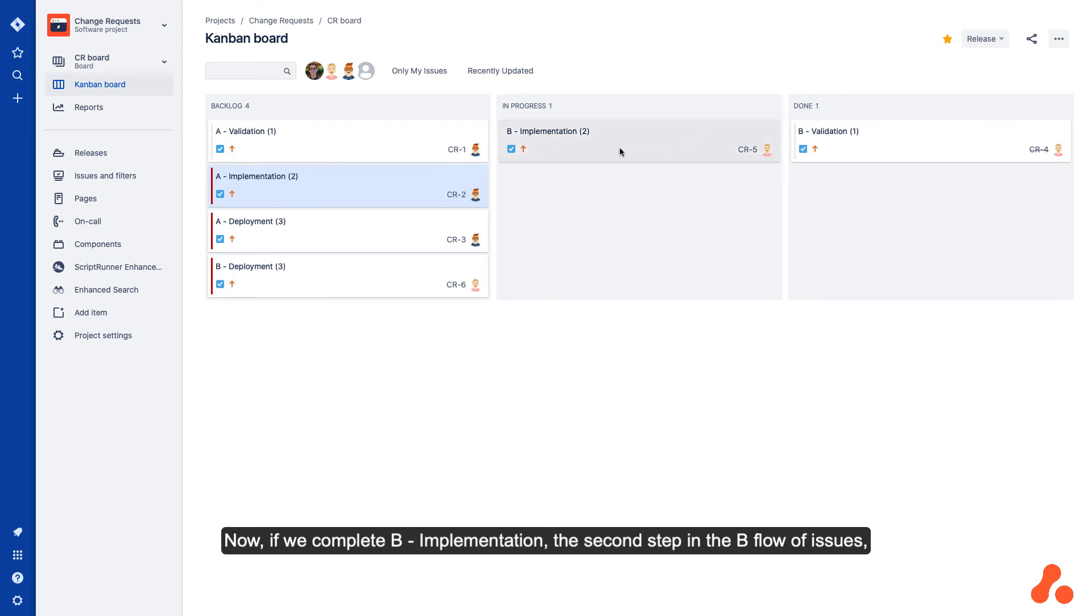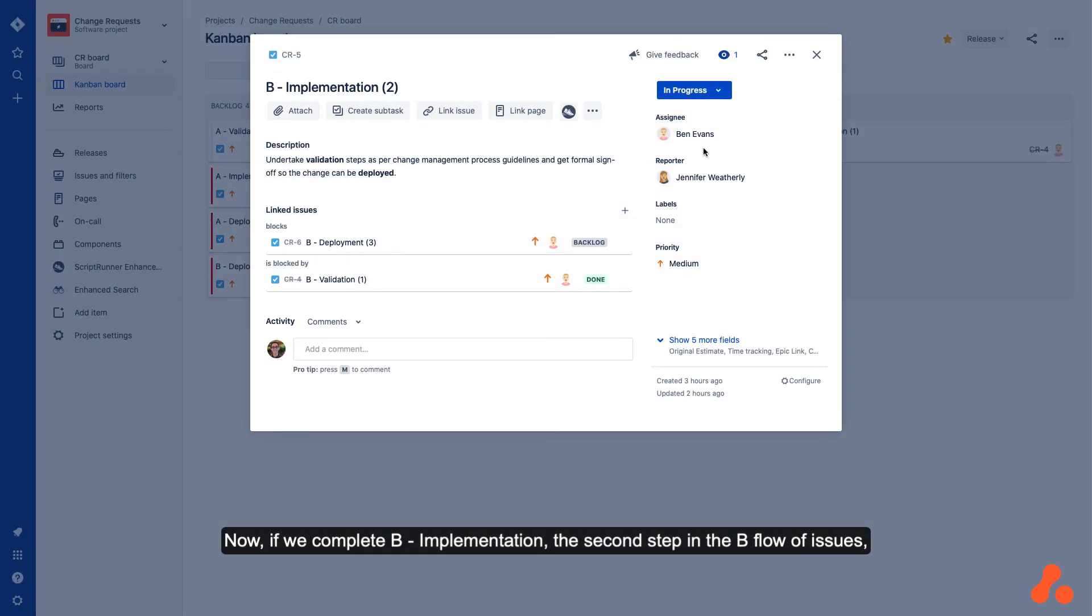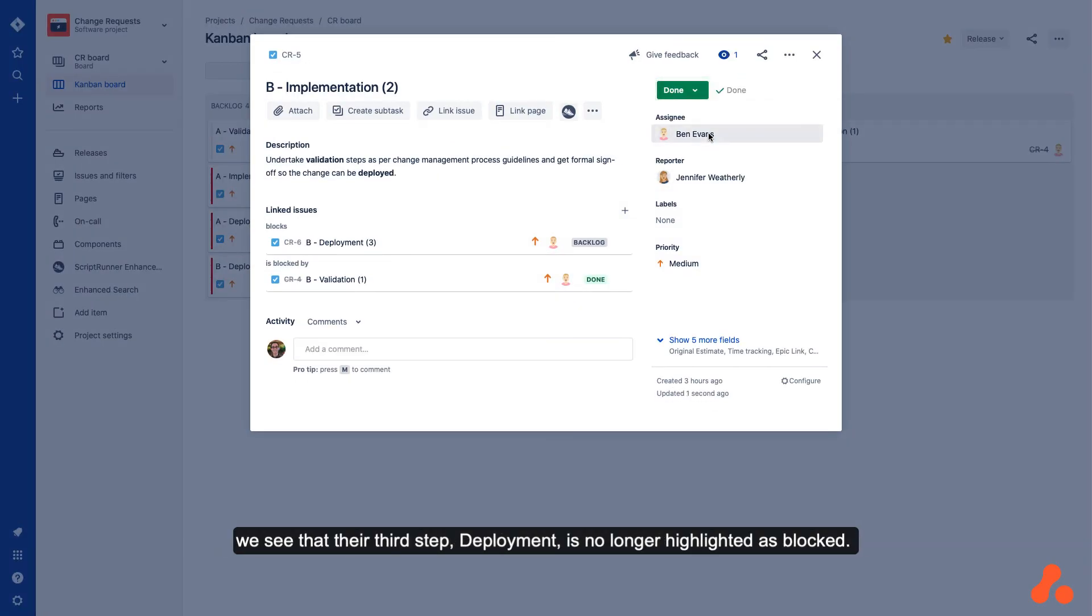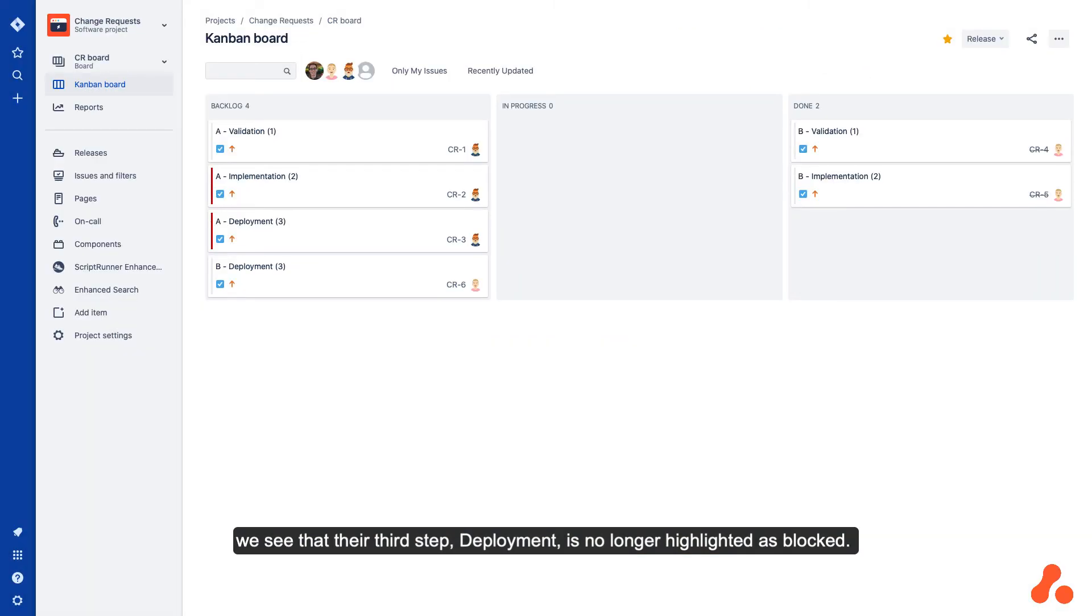Now if we complete B implementation, the second step in the B flow of issues, we see that their third step, deployment, is no longer highlighted as blocked.